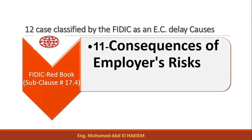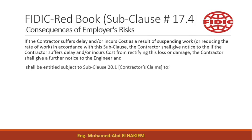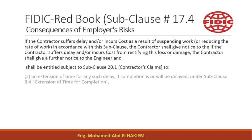Cause 11 – Consequences of Employer's Risks. If the contractor suffers delay and/or incurs cost as a result of suspending work or reducing the rate of work, or from rectifying any loss or damage, the contractor shall give a further notice to the engineer and shall be entitled subject to subclause 20.1 (Contractors' Claims).